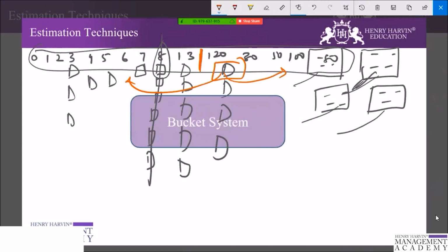Everyone quietly reviews the items on the scale, and if a participant finds an item that they believe is out of place, they are welcome to bring it to the attention of the group. The group then discusses it until consensus is reached and it is placed again in a bucket, so that every item gets one of the buckets. And if the divide and conquer stage has one or two people working very slowly through the items, it is acceptable to suggest that they share the remaining items with the people who have already finished.